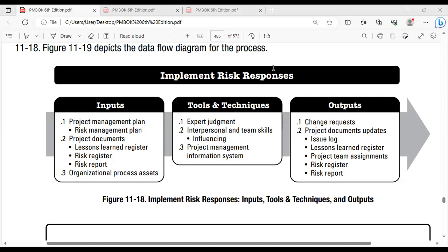So a subjective assessment can be done on your suppliers, or an objective assessment can be done on the suppliers based on the criteria. The proposal which can provide you a competitive range of price and goods, product, service will be selected, and you will be entering into negotiations. Once the party is ready to sign the agreement, you will be forming an agreement. It's a legal binding, or it can be a formal binding, depending upon the environment. And you're going to award the contract.